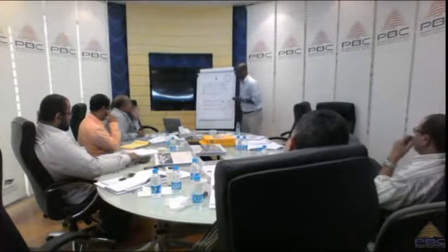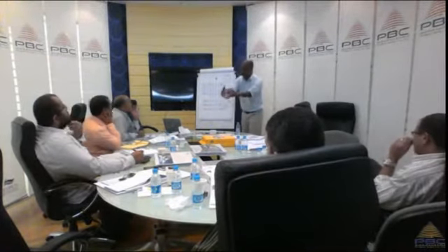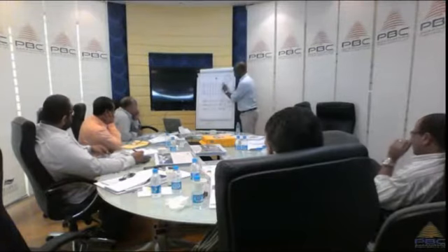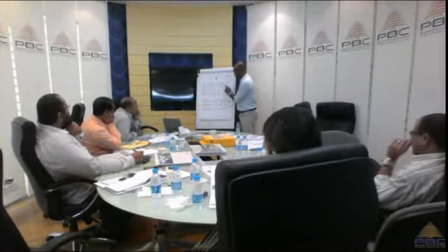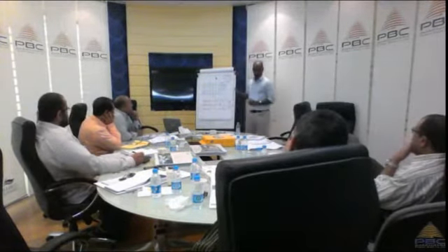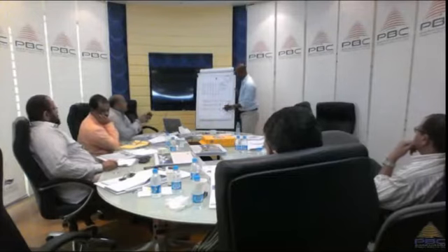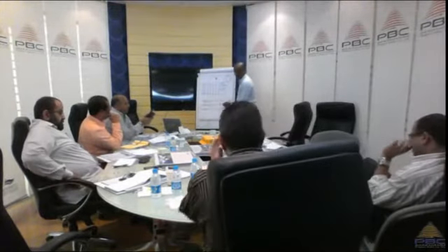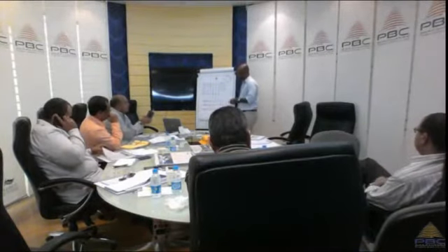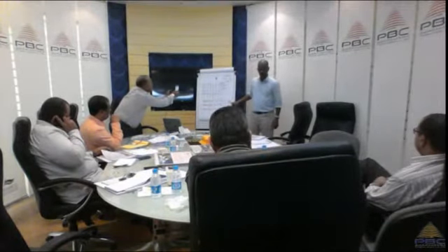So the earned value is the value of work actually created, delivered on the ground: one side completed, $1, 75%, 75 cents, 25%, 25 cents, so $2. This is my earned value. Comparing the earned value to the actual cost gives me the cost variance: money we spent versus the value of work we created. Comparing the earned value with the plan gives me a dimension for schedule. So we are behind by 1 day and we are overspending by 45 cents.